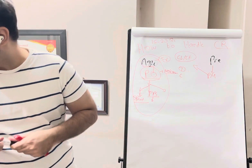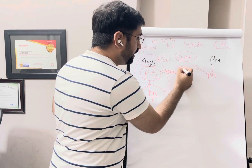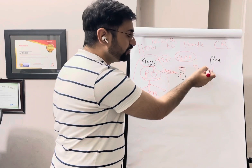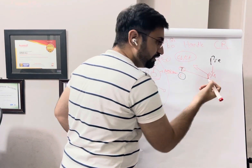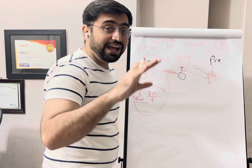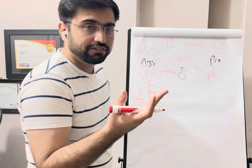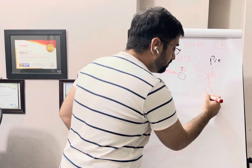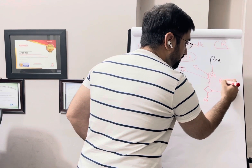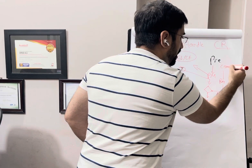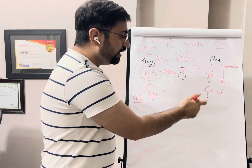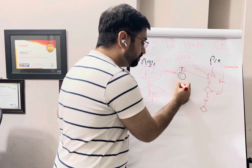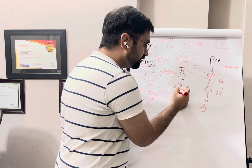The team logs the change in the change log and it comes to the PM. The PM evaluates the change. If the change is needed and affects the deliverables, it moves to the next step. If it does not affect the deliverables, the change is rejected and communicated back to whoever requested it.